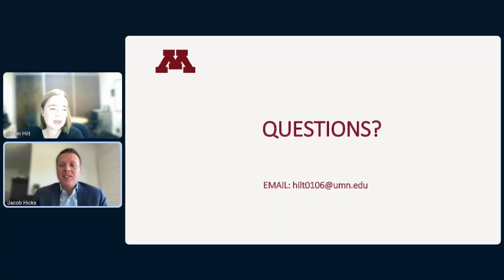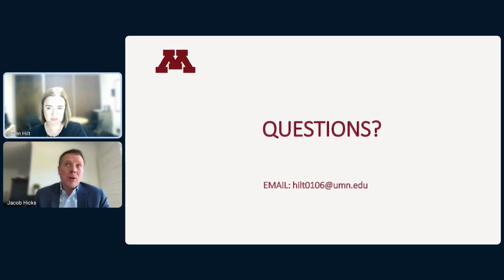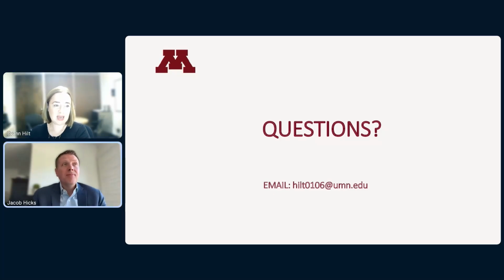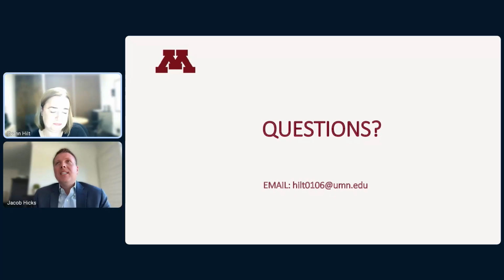I will say too, the actual validation itself didn't take that long. It's the other pieces of working with our institution, doing the test build, training staff, all of those pieces come into play too. So that's where I think of the whole process, from instruments in to the test or workflow being live. That's right, and there was an LIS integration here too. Yes. And remind us your LIS, Dr. Hilt. We have Epic Beaker. Yeah, that was a great milestone, to integrate with Beaker.